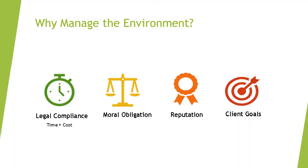So why is environmental management so critical to our business? Firstly, there's legal compliance. Working in sensitive environmental settings, close to protected species, managing waste and undertaking potentially harmful activities are all subject to regulation. To protect our business we must understand how to comply legally and obtain the correct permissions from the appropriate regulators. Failure to comply can lead to significant fines and even jail sentences. Obtaining these permissions can take time, require survey data and have associated costs, and a big part of my job is managing permitting and consent. Secondly, we have a moral obligation to ensure our projects do not cause harm, and failure to protect the environment or causing a pollution incident will adversely impact our reputation with the client, stakeholders and members of the public.